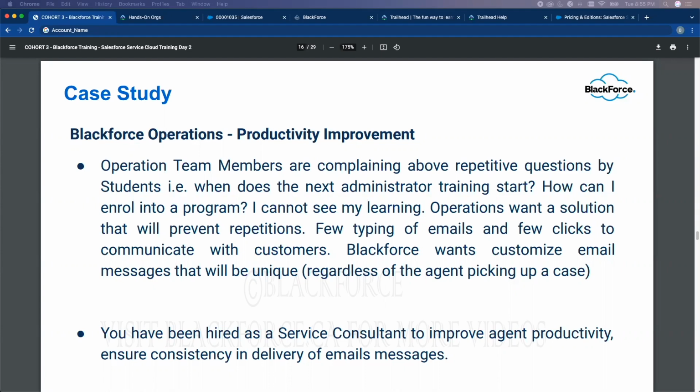So if there's a retainer, because if you make changes without the consultant's instruction, then you might violate the service agreement. If I do something right now, I deploy it and I have a contract to come every month to maintain that system, and I go back to that system in one month's time and the admin has done something I did not authorize, they've messed up the org. I can decide not to touch the org because I'll be responsible for anything that happens to the org.